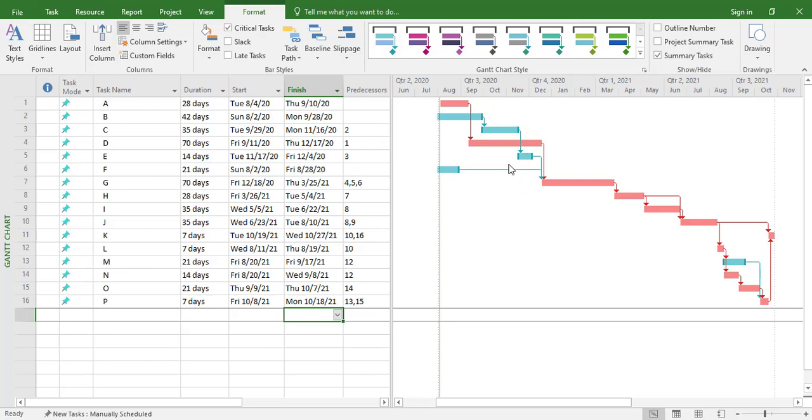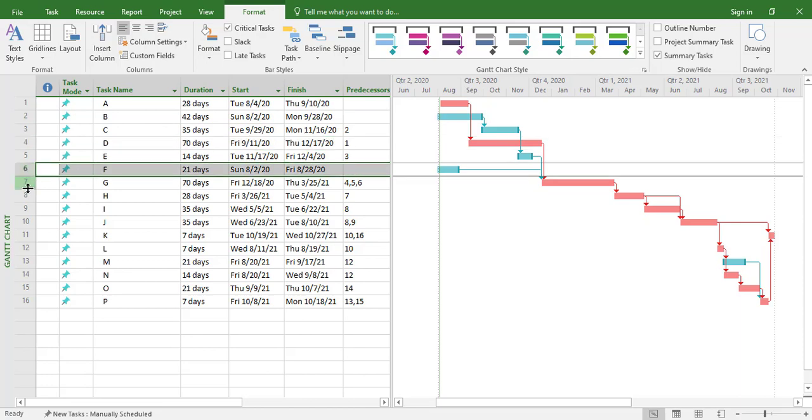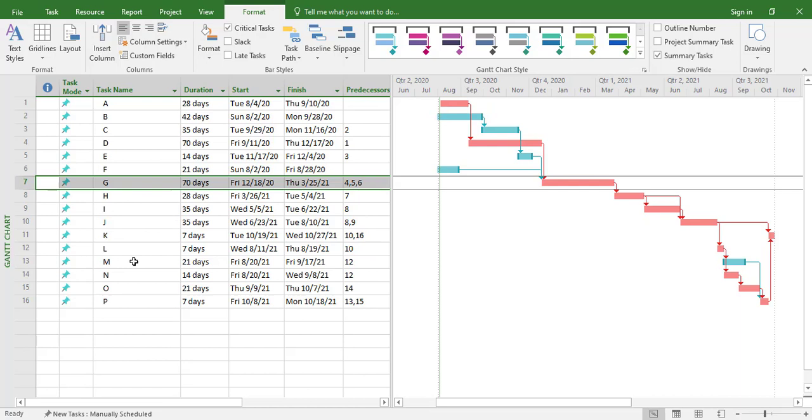So you can see here all these tasks converted into red or pink color are critical path, like activity A, activity D, then activity G. All these activities form a critical path. These are those activities with zero float, and if delayed, they can tremendously hamper our complete project timeline. So this is how you can identify your critical path by using Microsoft Projects.